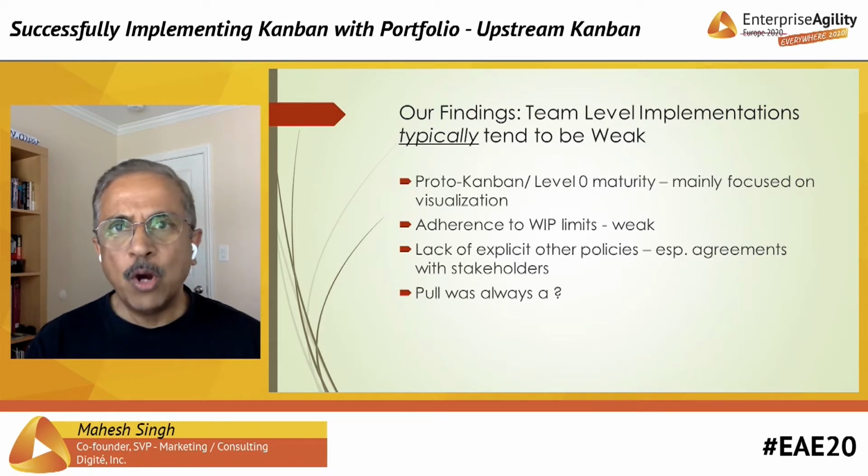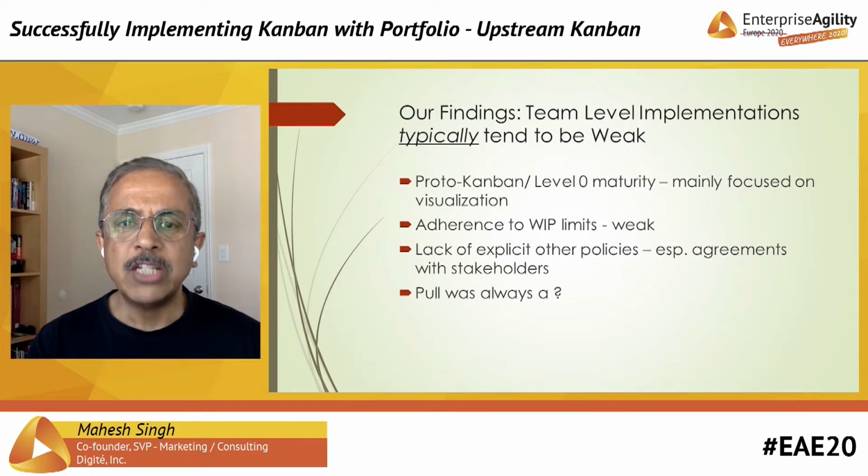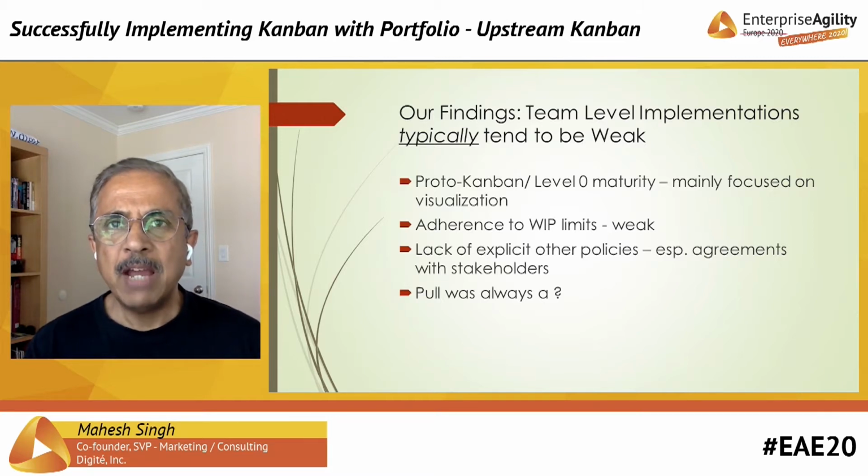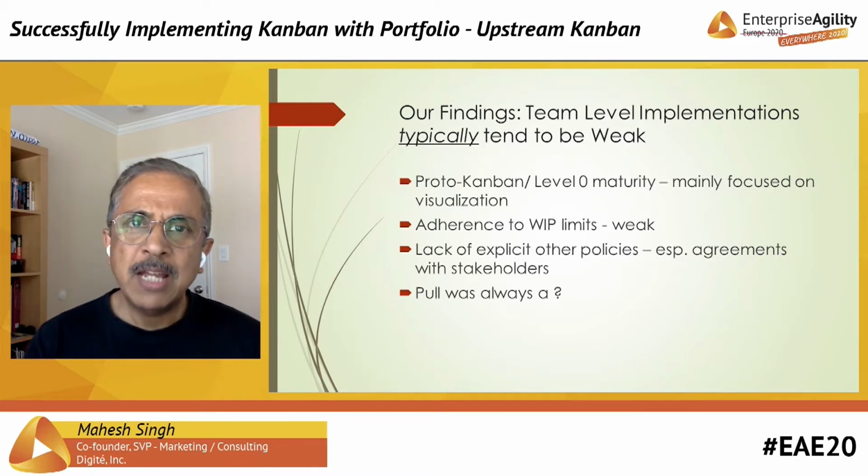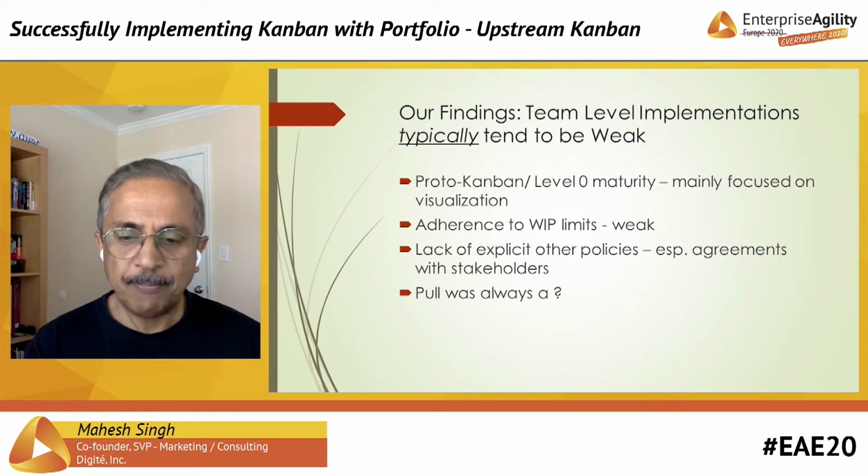The one thing that they do beyond visualization is that they define the WIP limits at different stages of their workflow. But the adherence to the WIP limit, the actual following of the WIP limit, remains somewhat weak. Other policies that they may have are not made explicit, and especially policies with respect to their stakeholders are almost non-existent.